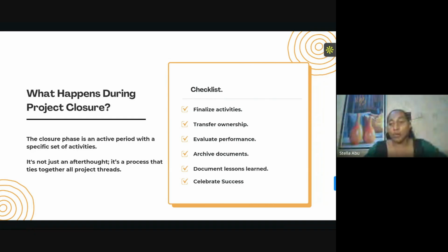The first phase can be making research, right? Your first activity can be making research, maybe you want to build a mobile app for a bread owner that wants people to start ordering bread online for a bakery store. First of all, you want to make a research. Do we have other websites like that for a bakery store? You break it down. That can be the first phase, right? After your research, the second phase can be UI/UX, right? What are the guys putting together? So basically, that's breaking things down, right?